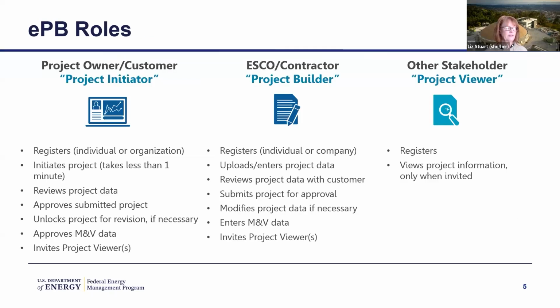So just a brief overview of the eProject Builder roles. The typical roles in a project: there's the project owner or customer. Typically, they will be the one to initiate a project into the online system. And then there is the contractor or the ESCO, and they are typically the one responsible for uploading, ingesting the data, and then submitting it for customer review.